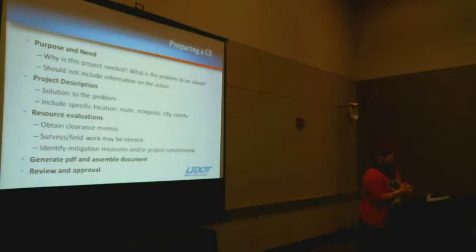Or you can say, we'll be rotomilling approximately 4 to 6 inches and replacing with appropriate pavement type, and you can even identify it as probably HMA, but if you change to a different type of material, that's probably not going to change your project. With things like changing from asphalt to concrete it might, but then again, it may not. So you kind of just have to use your own judgment.